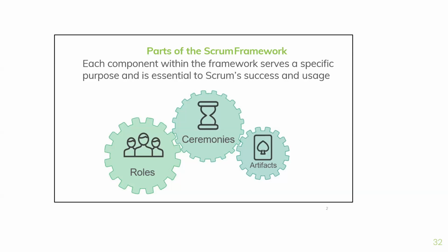And they're typically three. The product owner, more or less the product manager, the Scrum Master, which is us, and then the development team, which is your engineering team. That usually contains between 5 to 9. Standard is 5 to 9. But I've learned that in Nigeria, standards usually don't work. I mean, I've handled teams that are more than 10, but typically 5 to 9.